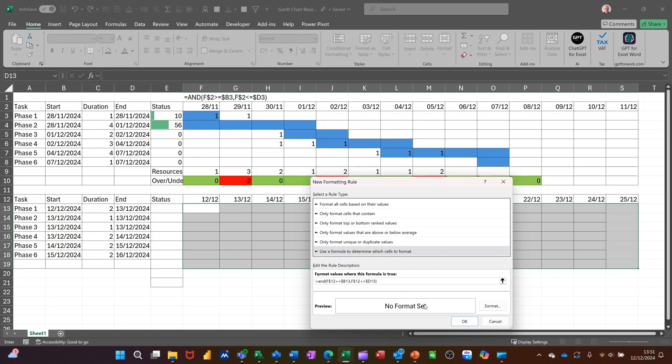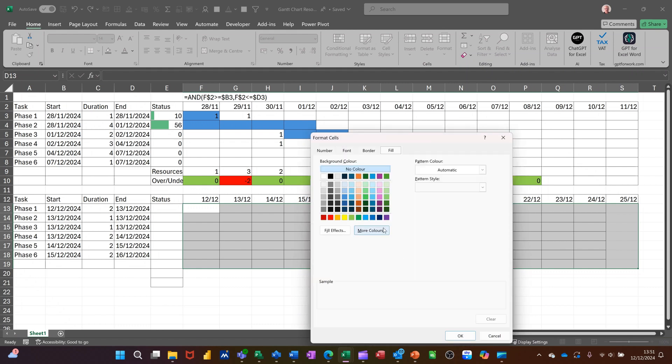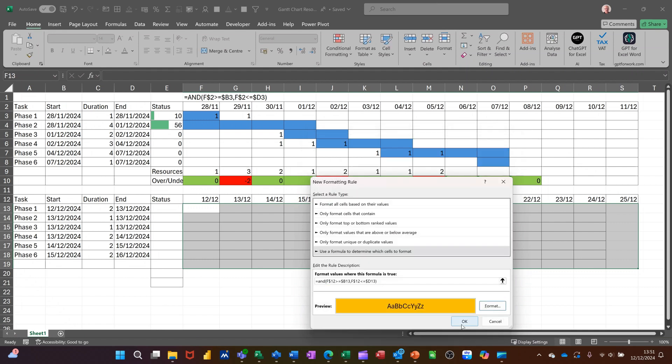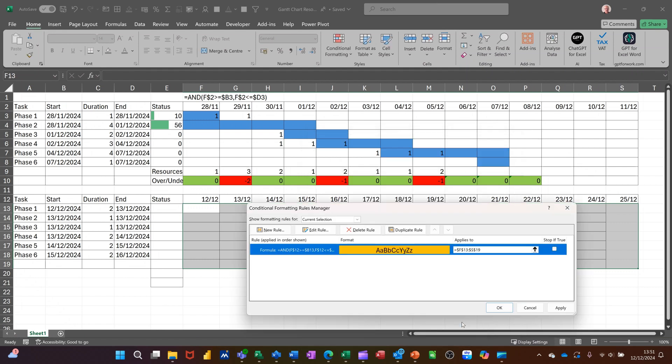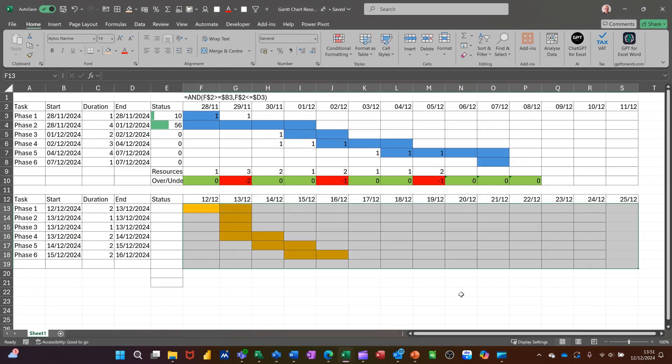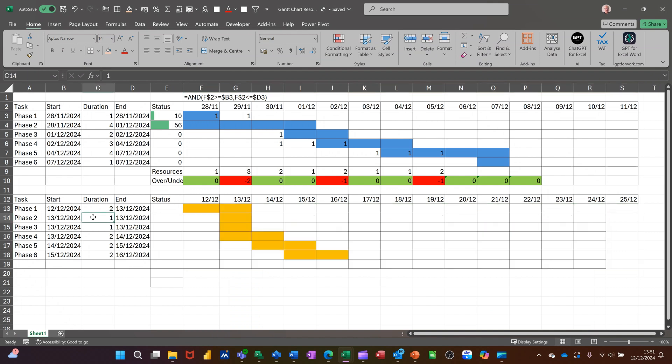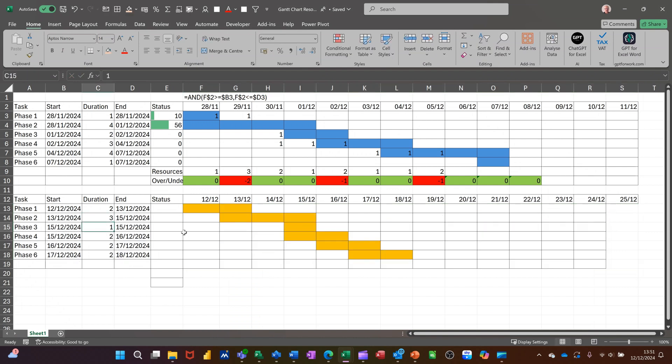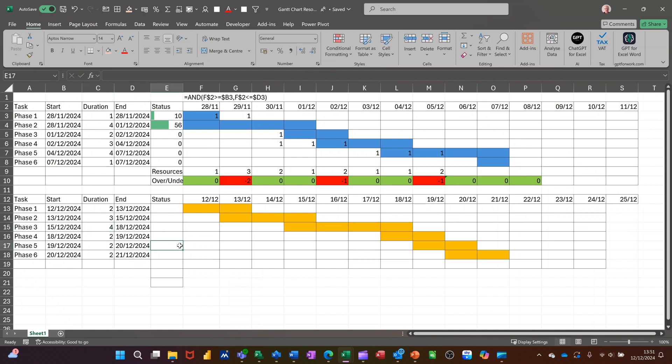Select the format that you want it to be, the fill. So I want it to be orange. Clicking OK to that. Clicking OK to that. OK to that. And then it fills it in. If you change the duration, that will just knock it over like so.